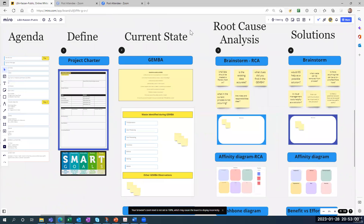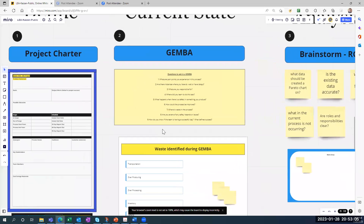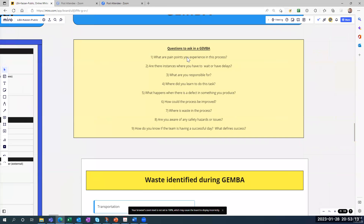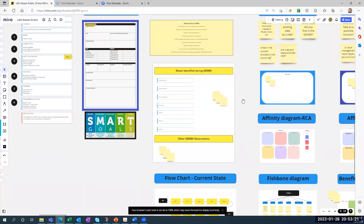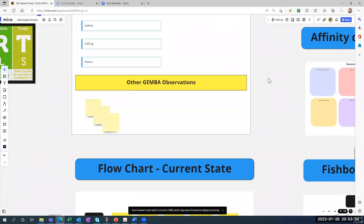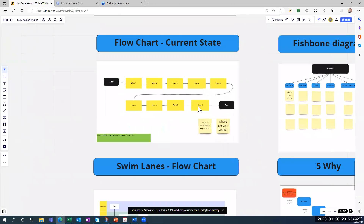The second section is current state, and there are two tools for that: Gemba walks and flowcharts. When your team wants to understand the process, you look at these questions here and go observe the process — maybe asking people these questions out in the field. When you get back from your Gemba, you use these post-it notes to write your comments, match them to the seven forms of waste, and put any observations that don't fit into a general category down below. After that, you do a flowchart — I've created a generic one here that you can move around, delete, copy and paste into, or build step by step.